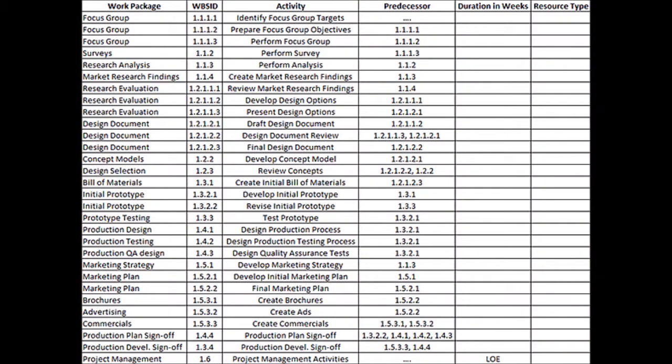The activity list identifies the activities that will need resources. The activity list includes an activity identifier and a scope of work description for each activity in sufficient detail to ensure that project team members understand the work required to be completed. We can see the activity list task dependency in this figure.